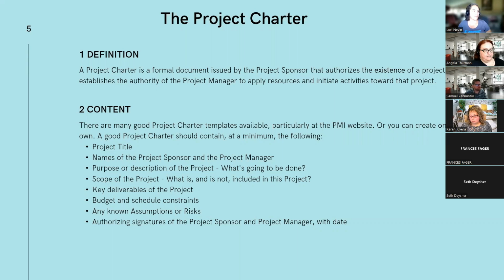Because ultimately you're doing this for some sort of result. And what is that result going to be? So you want to be as clear as possible what those things are. And then your project charter should have a statement of the budget and schedule and any constraints to that budget and schedule. You want to also identify any known assumptions or risks.